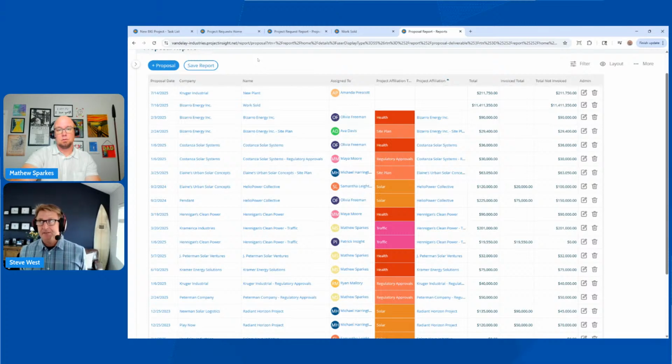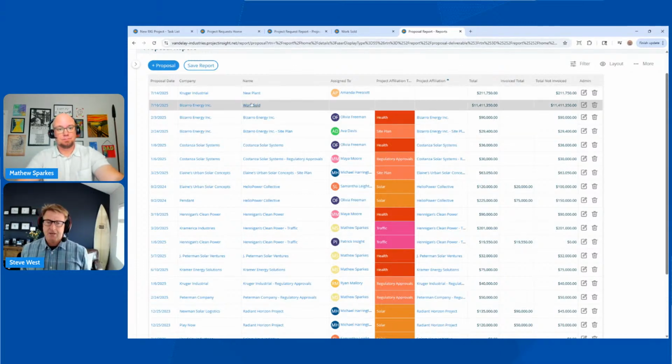This is very common. The benefit of the proposal process, especially if you're doing services, is that it does the same things as the request does, but you can track all the budgets and use that to help you forecast your invoice dates and then actually invoice and see what your progress is against those deliverables. So it's really a great way to manage all the orders. Because normally, without something like this, you get a new order, there's an email that goes out to your PM team, and then they have to manually enter all that stuff. And then they have a printout of the order. They don't actually have the order digitized with data that can be compared to the actual plan.